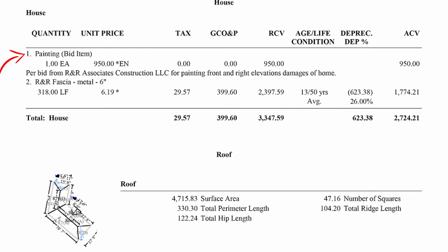So here's item 1, item 2. This estimate is in a format called Xactimate. Xactimate is construction estimating software that is designed for insurance companies and contractors to have standardized pricing. The pricing for the insurance job is basically dictated by this company called Xactimate, and the idea is that Xactimate gives a fair market value, fair market pricing.